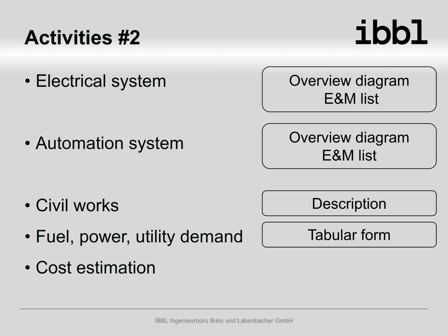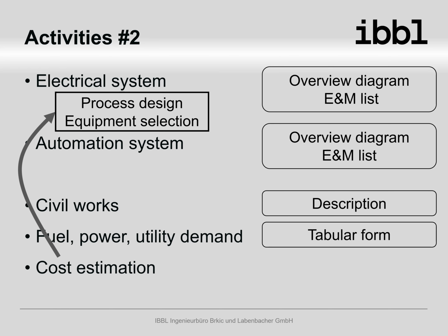Similarly, the operation costs are the combined cost of raw materials, power, water, fuel, personnel and so on. The values will be expressed in a cost per ton of product or similar. In case the cost estimation shows that the plant concept does not fulfill some requirements, the concept should be improved. The data are presented in tabular form.